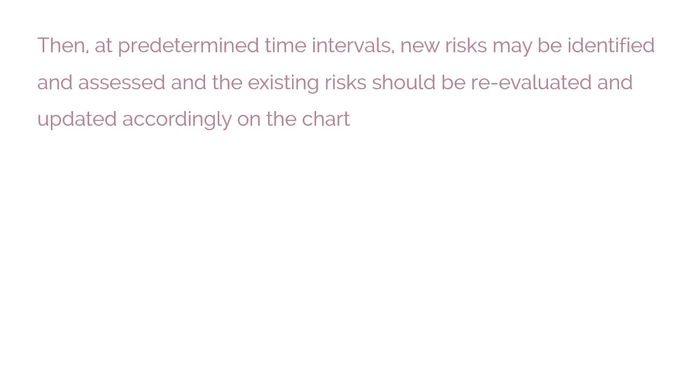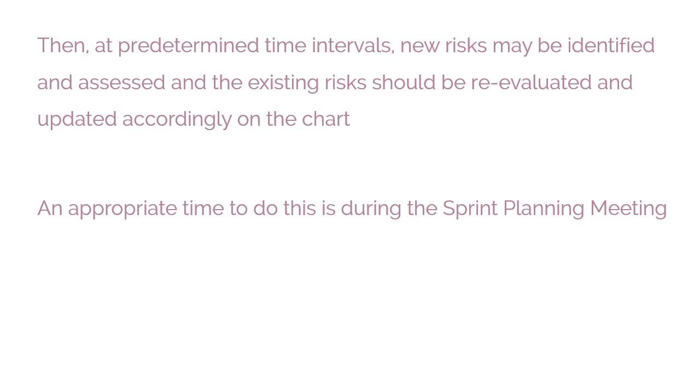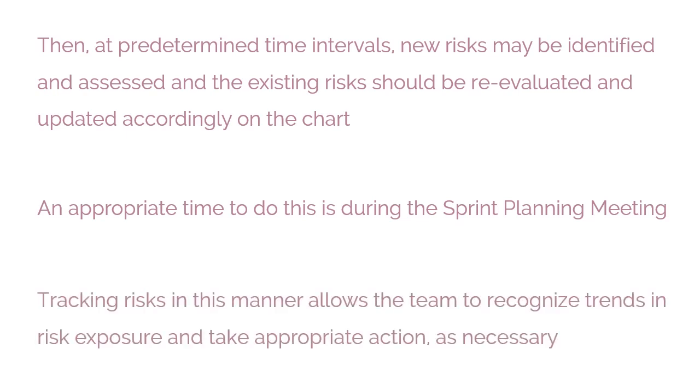in the initiate phase. Then, at predetermined time intervals, new risks may be identified and assessed, and the existing risks should be reevaluated and updated accordingly on the chart. An appropriate time to do this is during the sprint planning meeting. Tracking risks in this manner allows the team to recognize trends in risk exposure and take appropriate action as